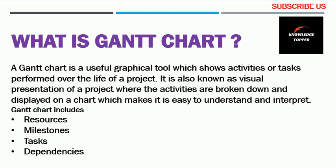All these steps are related and dependent on each other. For example, you cannot build a roof without wooden shuttering in place — you must first make an iron skeleton along with wooden shuttering and electric lines before laying cement on the roof. Each activity is dependent on the others. If one activity is delayed — say, your builder says wooden shuttering will take two weeks because it is placed on another project — your cement order could be affected, causing further delays and problems down the line.